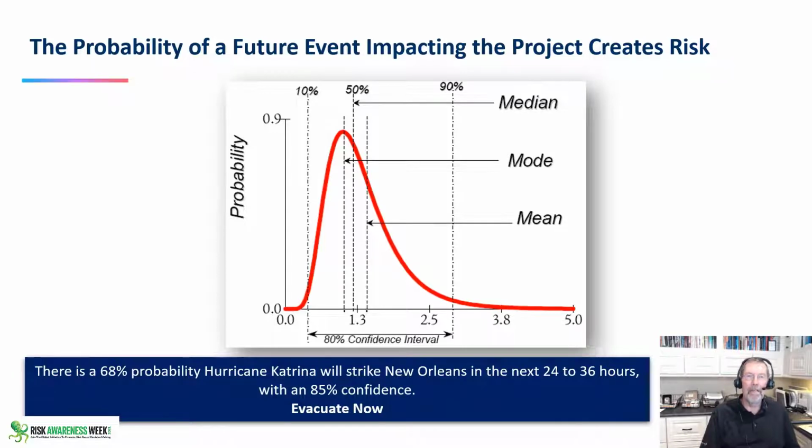And in our spaceflight business, when we submit the proposal, it has to have an 80% confidence of launching on or before the need date, and an 80% confidence of costing at or below the budget, and that probability itself has to have an 80% confidence. So it's 80 on 80. I've got an 80% probability of making the launch date, and that number itself has an 80% confidence.